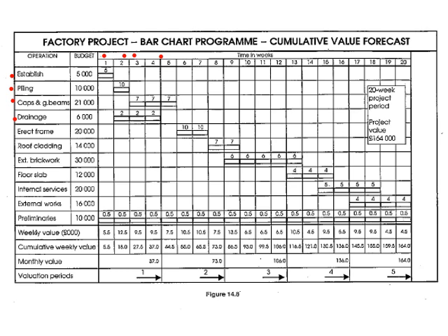Very simply, you just allocate your expenditure. In your first month, you would spend about 5,000 rands worth of work. Your piling is 10,000. The budget, your pile caps is this, drainage is this. This is now according to your quoted price or your BOQ.